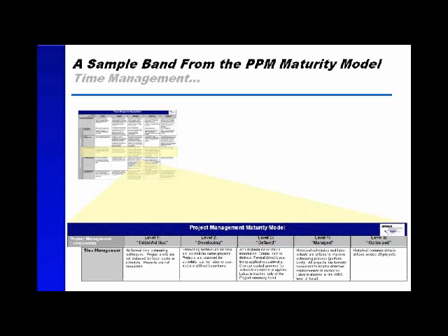and I'll read level 1, and I know this print's probably small for some of you trying to look at this, so I'll read level 1. If we have no formal time estimating techniques, if the project plans are not statused for labor or cost or schedule, and the projects are baselined, we're by definition a level 1 organization. Yet, if we want to get the promise of capacity versus demand balancing, we're probably looking at something like a level 4 or level 5.